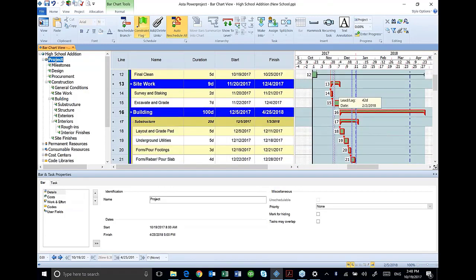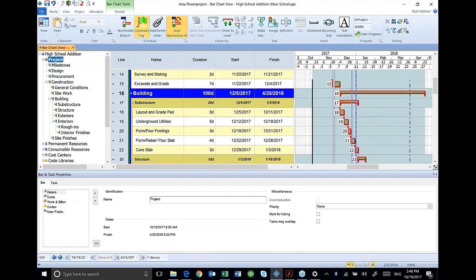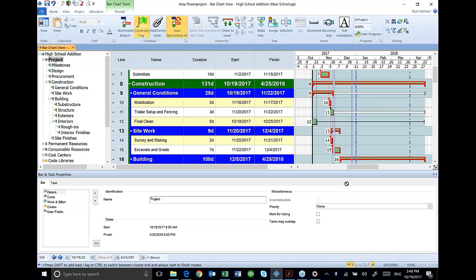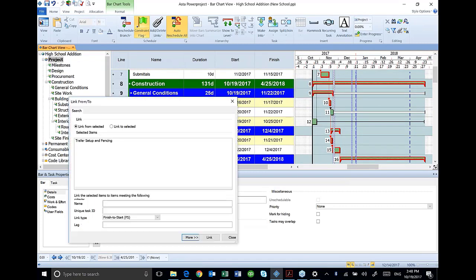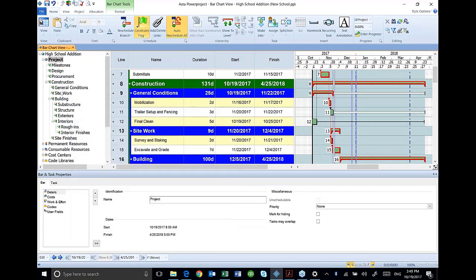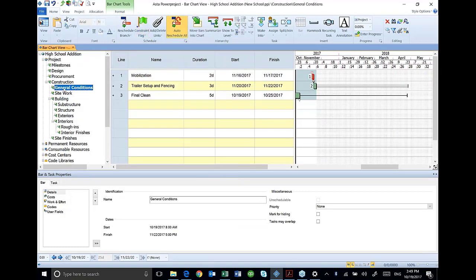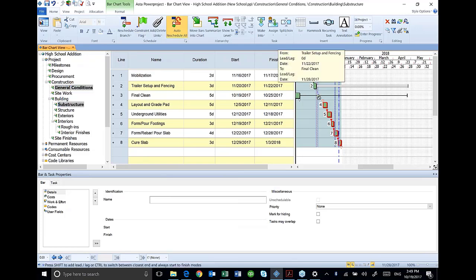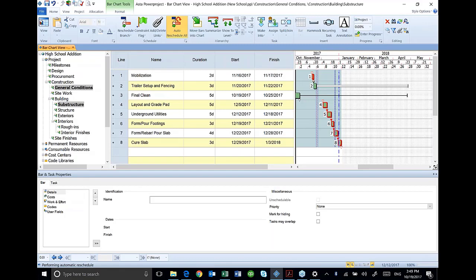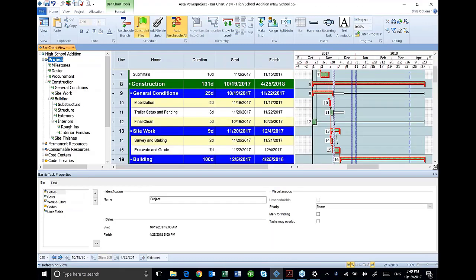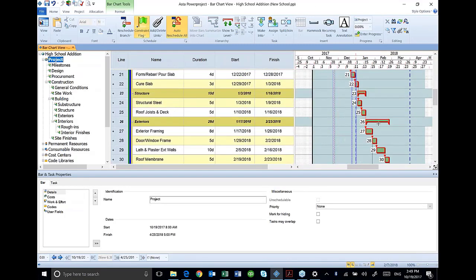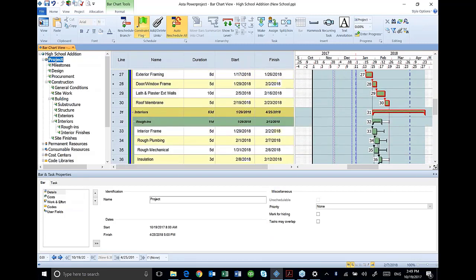And all of these appear to have, except for my trailer setup and fencing, I need to tie it to my underground. I'm going to do that by my general conditions and my substructure. There's my trailer setup and fencing, and there's my underground utilities. That's got to select. Let's see where I'm at. Everything else seems to have a good successor.